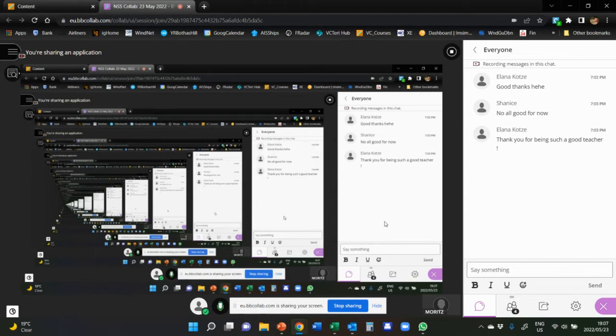either create a second file. And it's not like on the work breakdown structure you have to show all the dates and all the costs and so on. Because you only did that in the second level, that's fine. Below that, there's no need to give costs and stuff. Just the activity name and possibly a number for it, like 1.1 project planning, or activity 2.3.7 or whatever it is, and number the boxes in the correct numbering system.